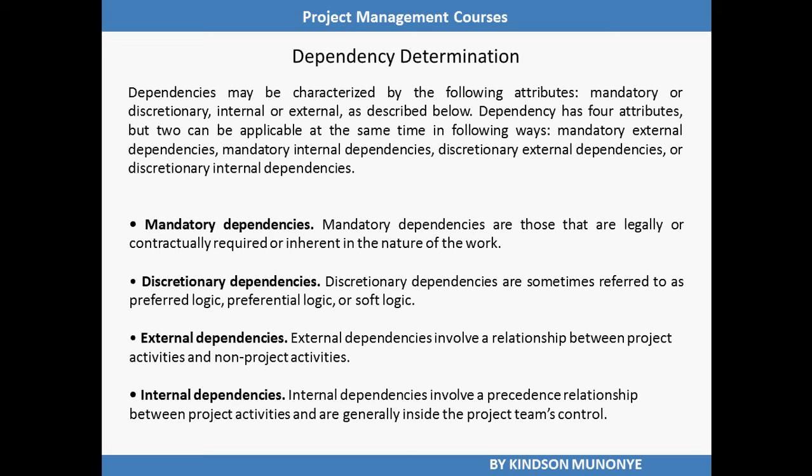Can we think of another one? Yes, the foundation has to be laid before the walls are erected. Mandatory. You can't change it. You can't erect the walls before the foundation. It's mandatory, meaning that it must be that way. It's also called hard logic.